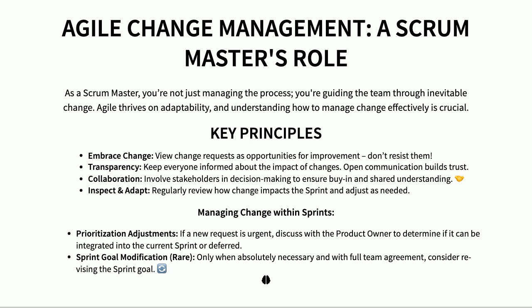When it comes to managing change within a sprint, it's often about prioritizing: can this new thing fit in, or should it wait until the next sprint? And rarely, if ever, might we need to adjust the sprint goal itself, but only with full team agreement.